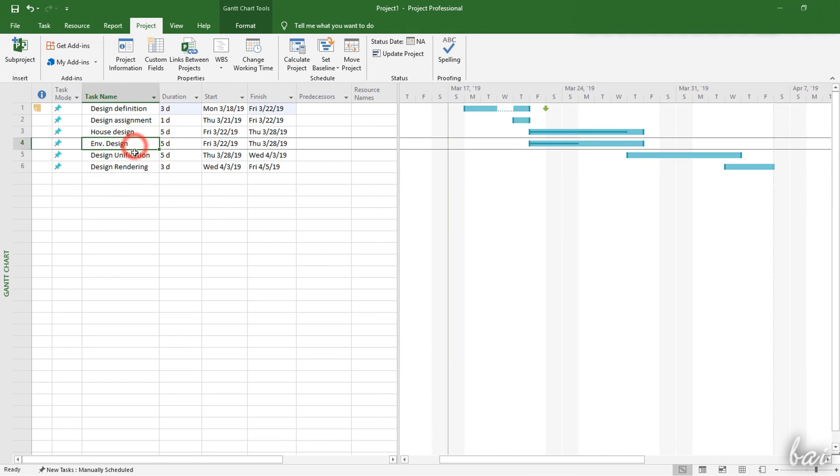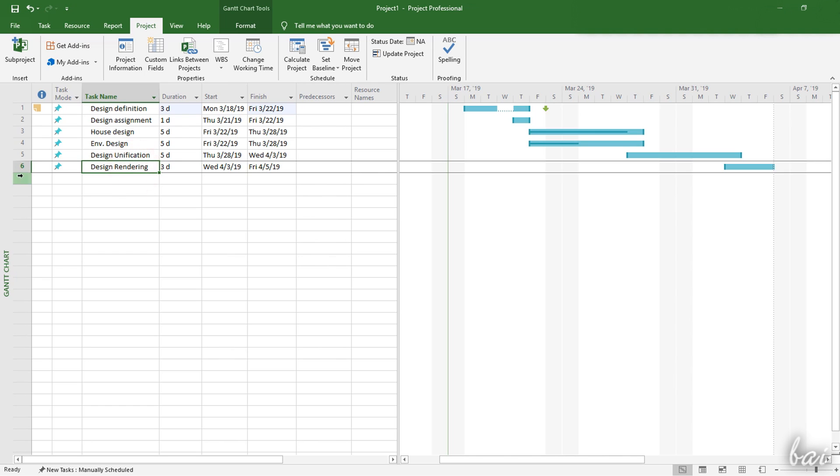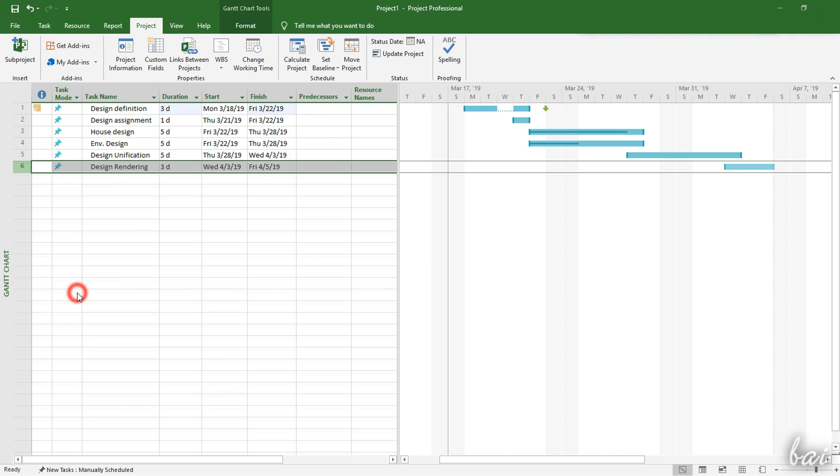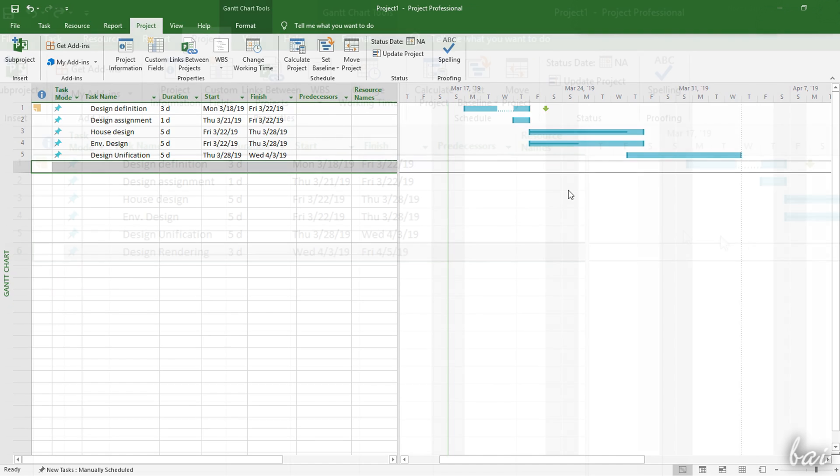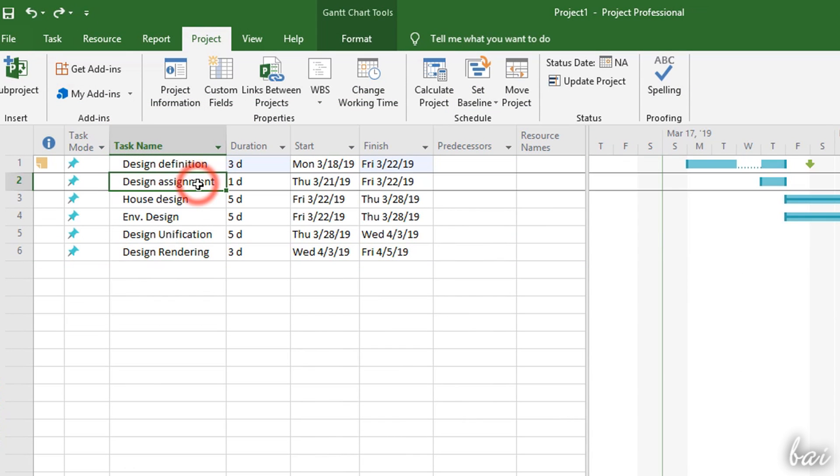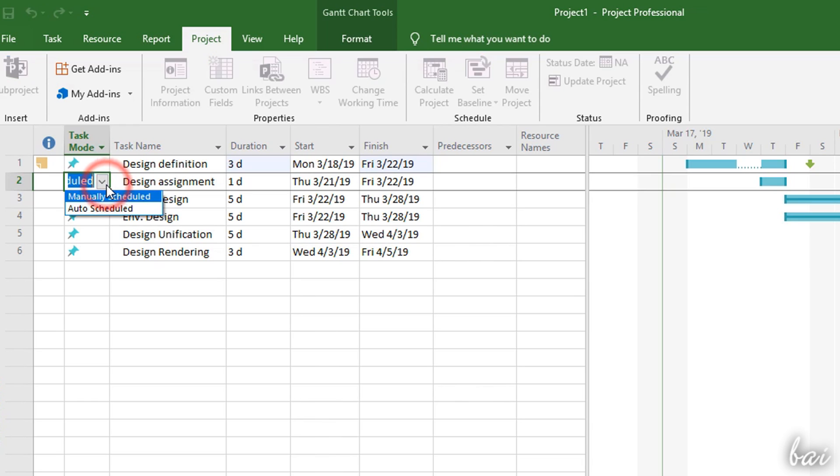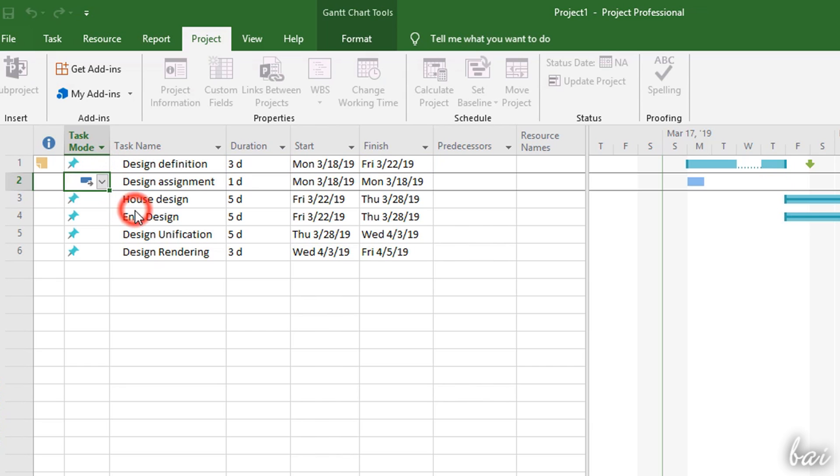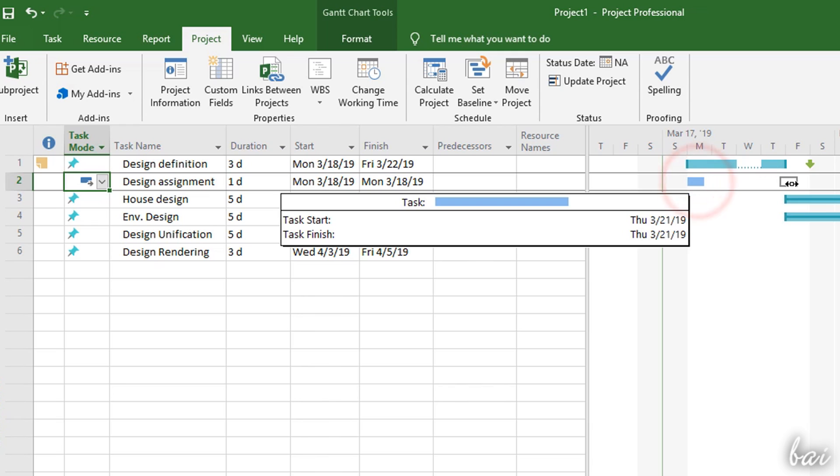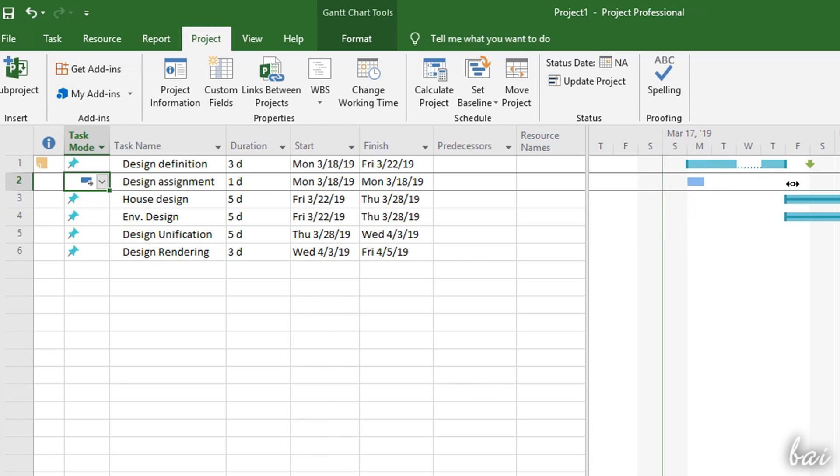To remove any task, just right-click from the Task Sheet and go to Delete Task. By default, all the new tasks created are manual scheduled tasks, with a pin symbol on the Task Sheet and with their start, finish and duration managed manually. From Task Mode, you can turn these into auto-scheduled tasks, which are moved and edited by project in case these do not respect the constraints you define, for example any deadline or limit.